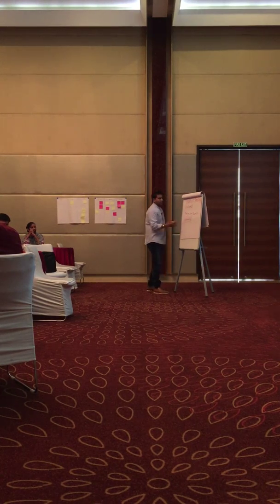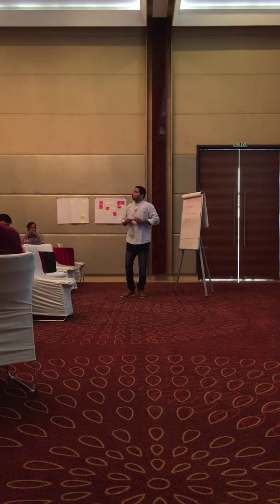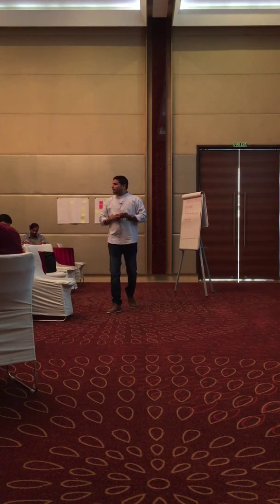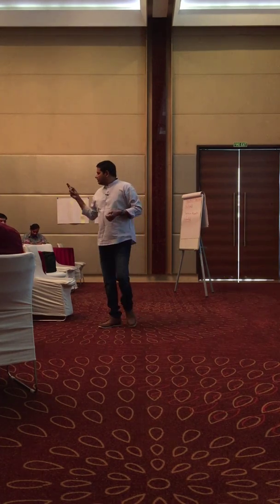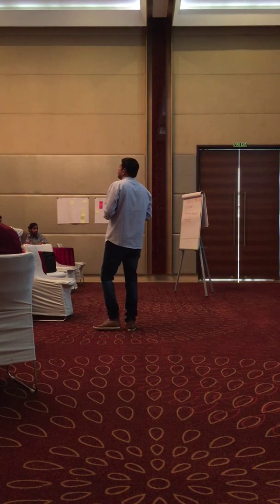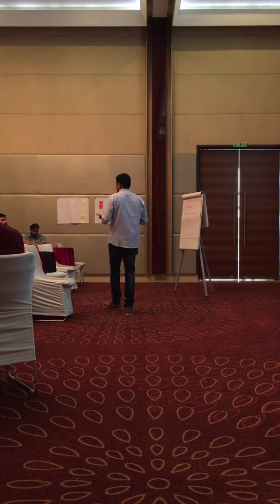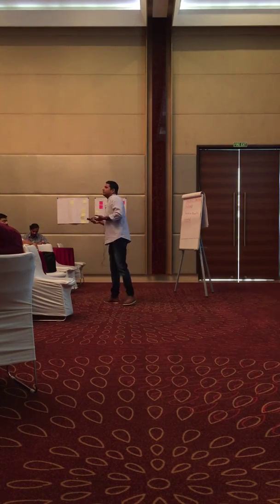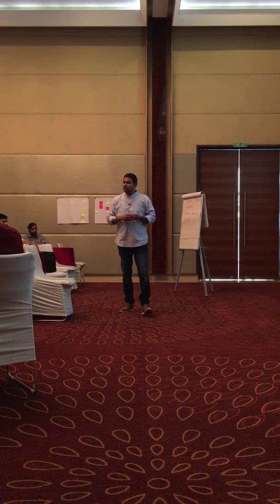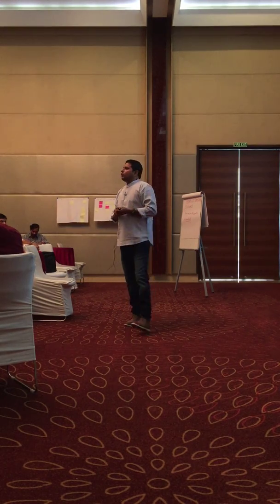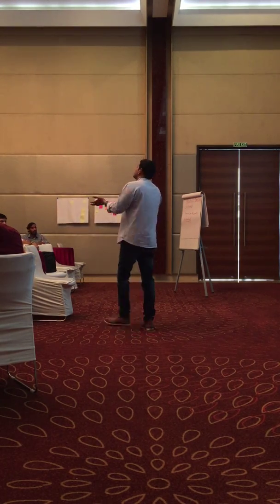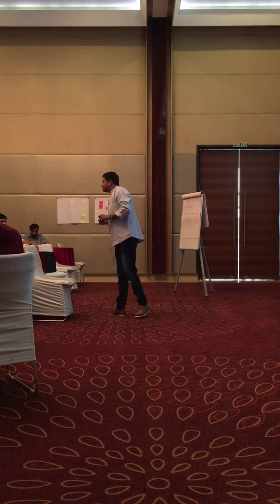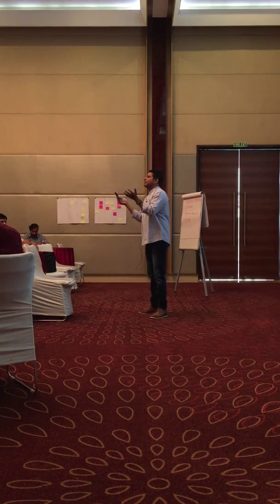Backlog items must be estimated. Who will estimate? The development team will estimate. There are multiple methods you can follow. One of those methods, very popular and invented by Mike Cohn, is story point estimation. That is using story points, right? Which will give you the size of the items.